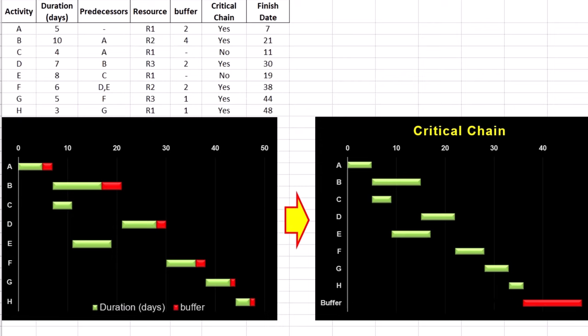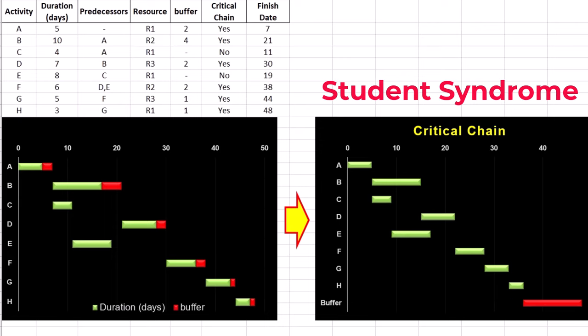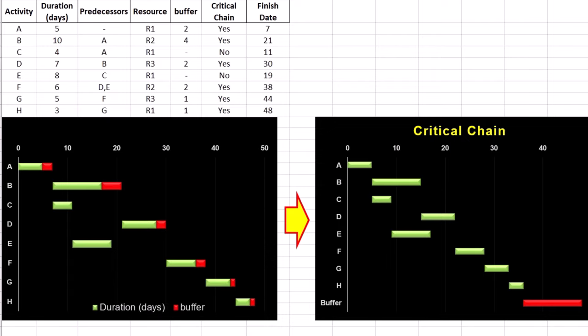Project buffer also addresses student syndrome or starting activities at the last possible moment. If you want to implement CPM in Excel or draw Gantt charts, the video links are provided in the description.